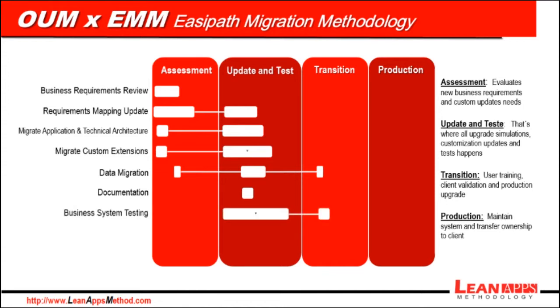Next process is business system testing, and the goal here is to develop an integrated approach to testing the quality of all elements of the application system in the pre-upgrade, technical upgrade, and post-upgrade steps. This is the most time-consuming process in an upgrade project.